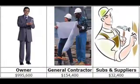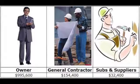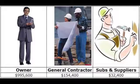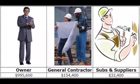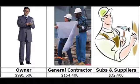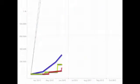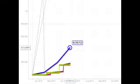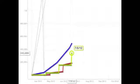In the second month, the contractor has earned $193,000. The owner will then pay the contractor $154,400 due to retainage. The contractor will then wait 14 days. The red line continues to go up due to expenses incurred after 14 days the contractor will wait to pay his subs.